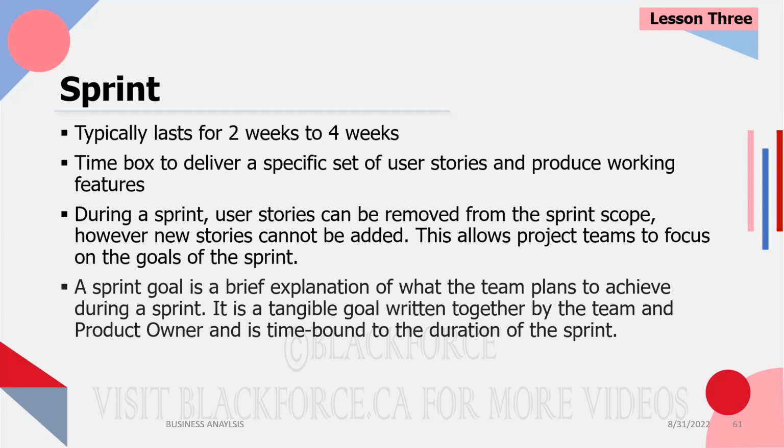During a sprint, user stories can be removed. However, no new user stories can be added. This allows the project team to focus on the goals of the sprint. So every sprint has a goal.